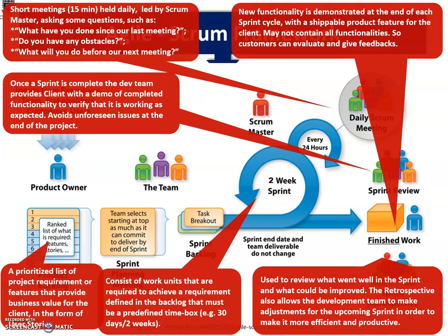Once the backlog is established, the team will decide on sprints. A sprint is a period of time where the development team will complete a set of tasks from the backlog. These tasks are usually determined based on priority level and effort, and are reassessed in sprint planning meetings at the beginning of each sprint cycle. Teams typically pick sprint cycles of 2 weeks because it's a good time frame to complete a substantial amount of work while still having enough flexibility to pivot and reprioritize.